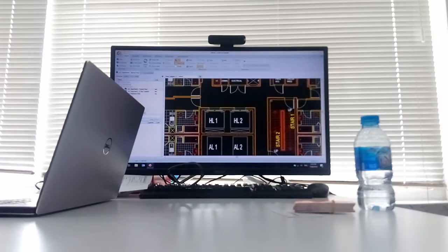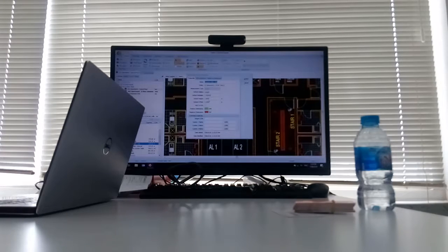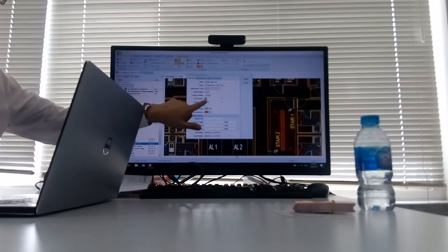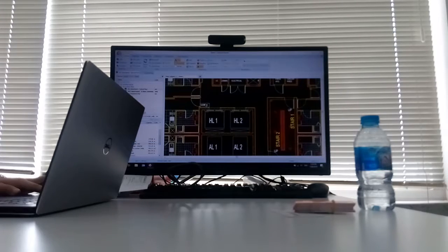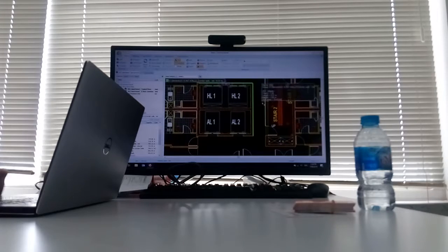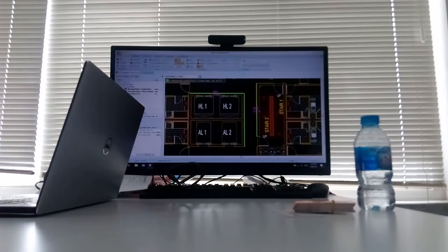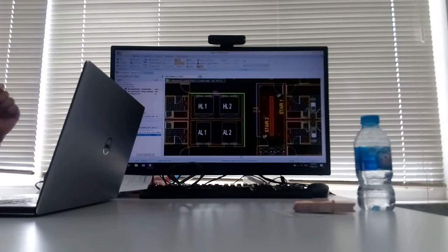I mean, obviously it's easier from a model, but for this, just like this. When you start to do measurement, we'll input the default height. So this is option 1. I put the floor height 2.8, floor to floor, without considering any beam in between. So let's say I put the spacing and measure the length. Afterwards, when I measure on these drawings and I just measure a separate line, how do we identify here? Because you see, you have 1, you have these 2. Just for example, on top of this wall, you know clearly what the beam size is.